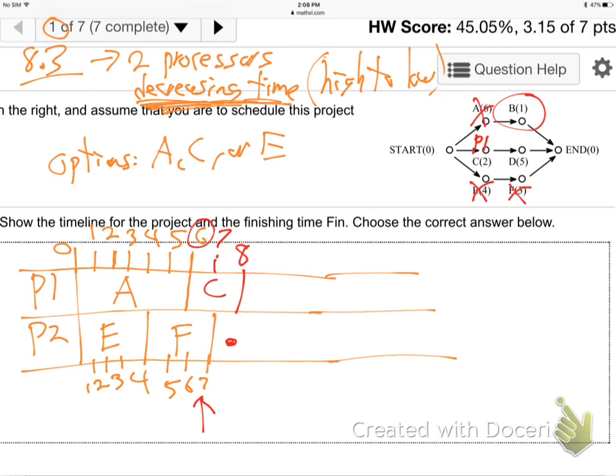You really got to focus on the time element. You got to realize where you're at in time. Job C is still being worked on. It's not done, so D's not available. That's the mistake a lot of people make, is they'll stick in job D right here. That can't be. You cannot start. They're starting job C at 7 hours, and C is not done till 8 hours. That can't be. Right? So watch out for that little stuff.